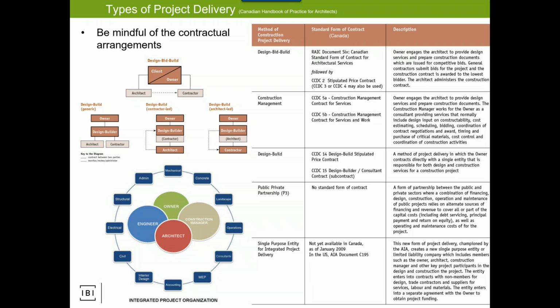So those questions, and then it'll come to us. So imagine that for a moment. Imagine the structural engineer models the beam, models the column. Contractor is saying, no, model the connection. Is it going to be a moment? Is it going to be bolted? Is it going to be welded? Model the connection so that I can properly depict it. And you're going to be sitting there as a BIM coordinator, and the takeaway has to be, well, normally structural engineers don't do that. So what is the answer? Is it a third party? I would come back and say, get the steel fabricator to build a fabrication model. And then the contractor can have that. And it brings the liability to where it's supposed to be, with the fabricator, not the structural engineer, the design engineer.